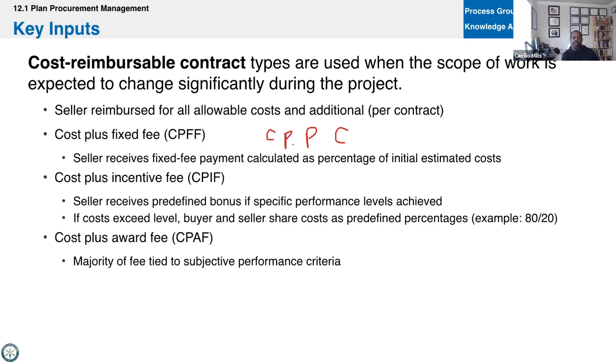For the award fee, they'll be pretty explicit about the fact that it's subjective and that it could range, so they're not really trying to trick you. They're just trying to see if you can remember that one is predefined, outlined in the contract, and here you don't really know. It's subjective. The fixed fee is pretty straightforward. And don't forget the cost plus percentage of cost. That's going to come up as well. You're paying just a percentage of whatever the materials and supplies are that you're buying.